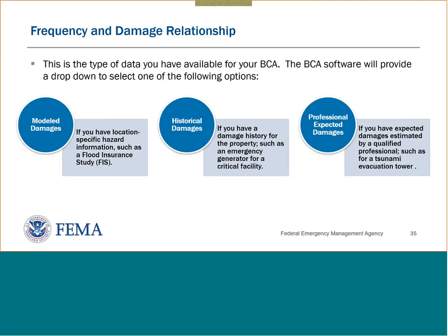Oh, this is important. The primary data are these historic damages and losses, and the dates or years for those events. So you've got to have at least one event of a known frequency, which means that you know the recurrence interval, and we'll talk about that.